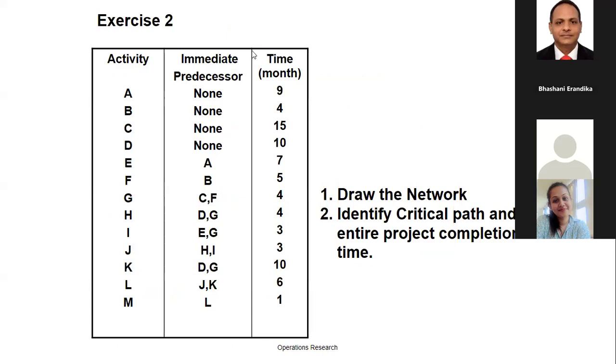Okay, better to draw it yourself now and just try to find the critical path. Then after that, I am going to explain. I think it is much better if everybody takes a piece of paper and draws the network diagram according to the instructions I gave. Draw the circle somewhat bigger and divide it into 3 parts. Write down the event number and keep space to write down the early starting time and latest completion time. After the diagram, write down the given duration, and identify the early starting time and latest completion time. Then you can find the critical path.